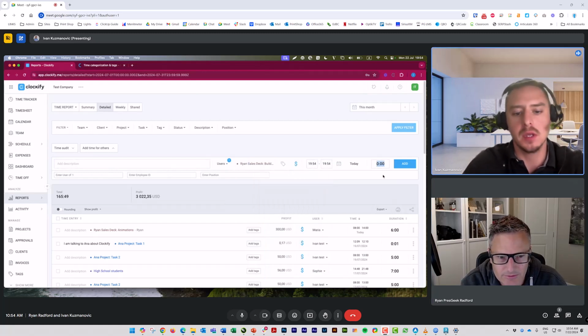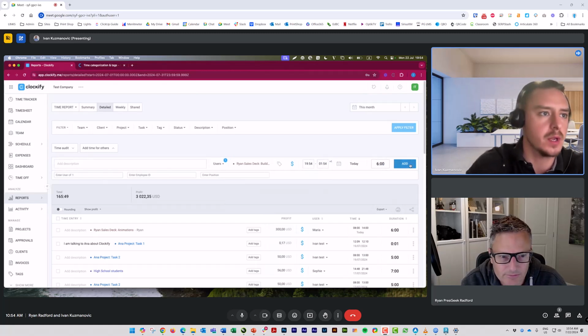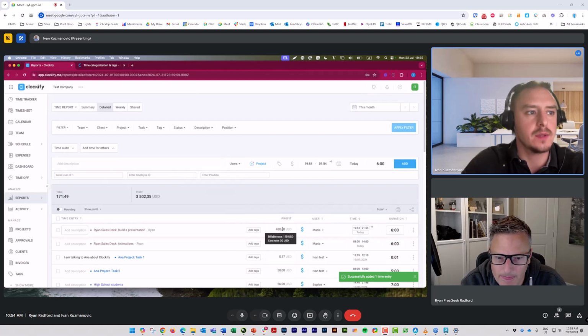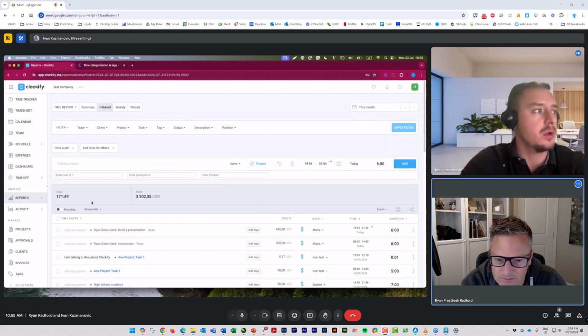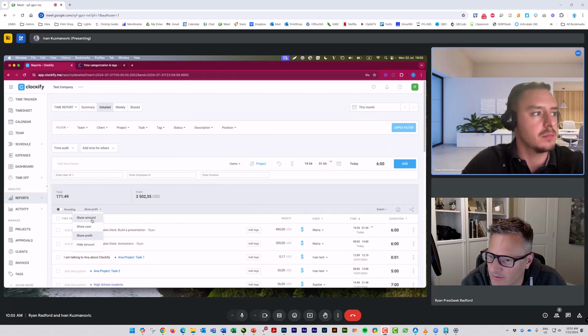And then we're going to say, okay, here she worked, let's go with 6 hours again, because we have different rates. So here billable rate is 110, cost rate is 30. For this specific time entry, our profit is 480. Or if we are wondering about the amount, we see the amount and we see the cost.